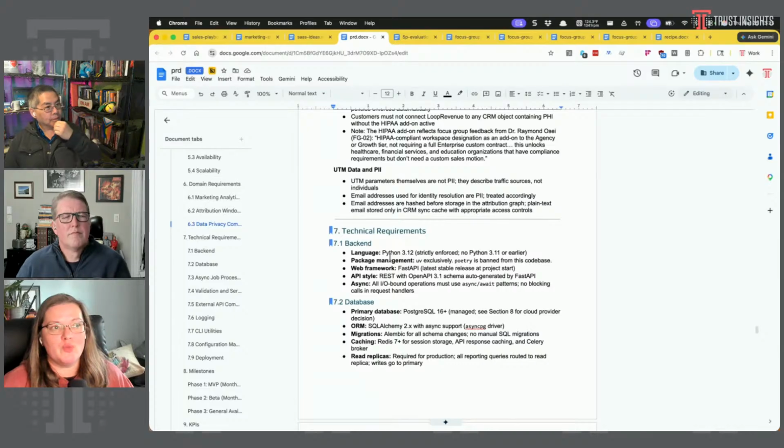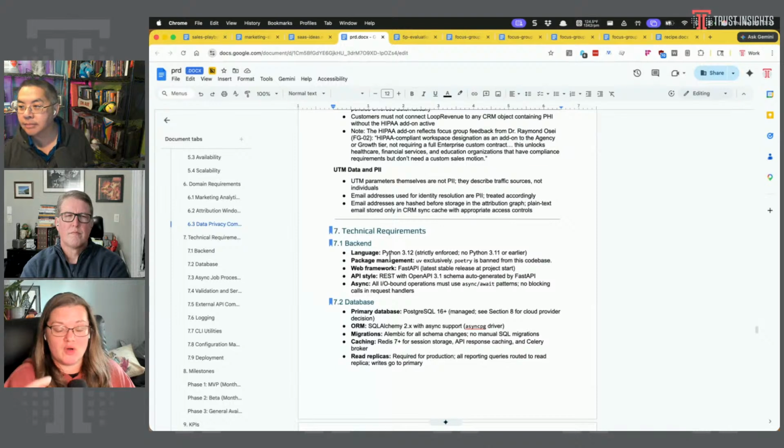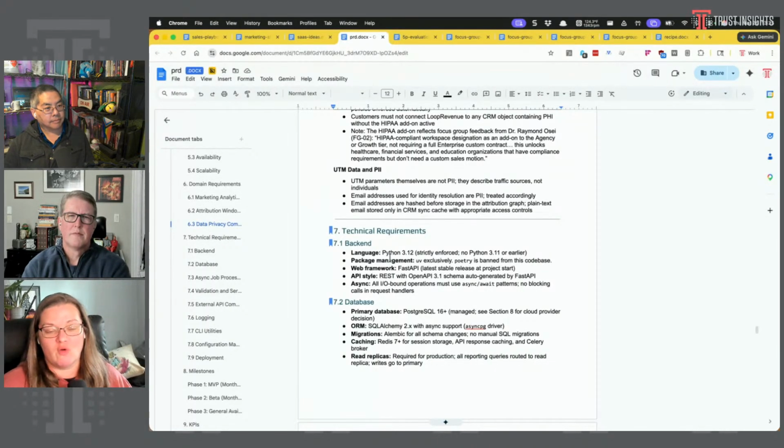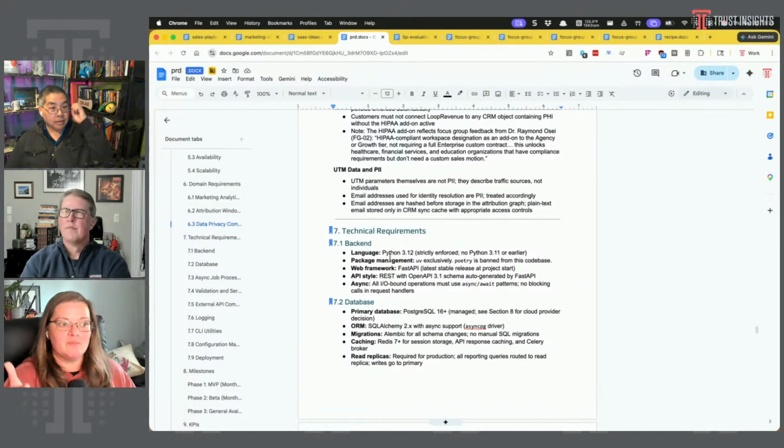So what we always say in software development, because this is software development, is if you spend more time upfront with the requirements gathering, you will spend less time actually developing. The development itself is what's expensive. To change it, to alter it, to say, oops, I forgot the thing. Spend the time doing this. So I'm glad to hear that you went through so many iterations. I would expect before anything gets developed in an ideal world, you'd go through a few more iterations. But for the purposes of this, I'm sure it had its own measure of success of when the PRD is thorough enough.